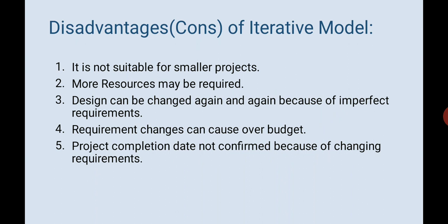More resources may be required, which is very true, because every time you do an iteration, you are releasing it and developing the next version. So the same manpower which designed once in a waterfall model is now doing the next iteration, third iteration, fourth iteration. So many resources are required: the cost, the effort, the time, different things.